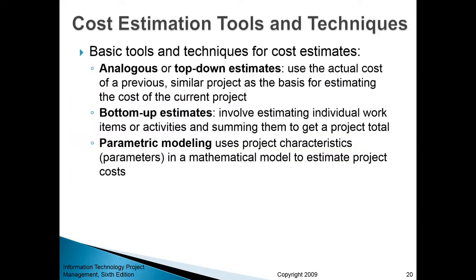What are some other cost estimation tools and techniques? There are three approaches to estimating costs. One approach is called analogous or top-down estimate. You use the actual cost of a previous similar project as the basis for estimating the cost of the current